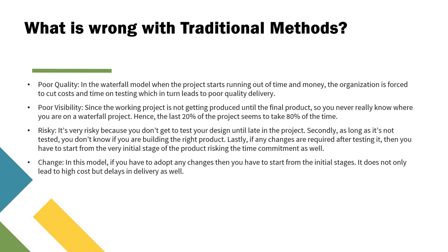And visibility is poor, since the working product is not produced until the final product, so you will never really know where you are on a waterfall project, and the last 20% of the project seems to take 80% of the time in waterfall.